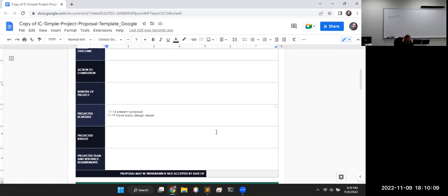I probably could have pulled out some pages that I don't need the notes instead of grabbing 3 blank ones. I didn't think ahead on that one. But make the schedule detailed. When's the project progress report due? It should be 21 days after that, which should be the 29th, I guess. I'm not going to check the calendar, but something like this. On the 29th, submit progress report. And some templates will have a progress report section.